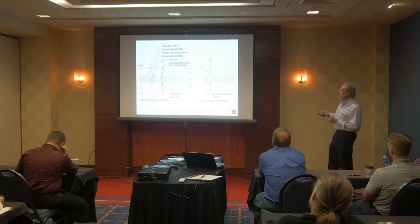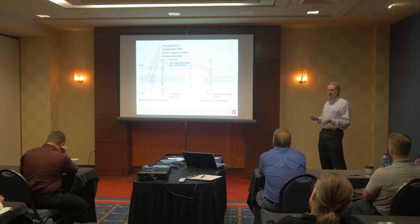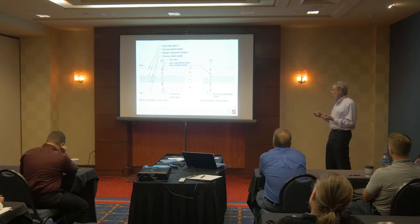there, put on the snap cover, custom profile. YKK did this, and they were willing to do this custom-shaped snap cover, so it completely trims the opening when they put the snap cover on the pressure plate, put a sealant joint out here, and it's done. So it's an amazingly fast installation, and so J.E. Dunn was very, very happy.